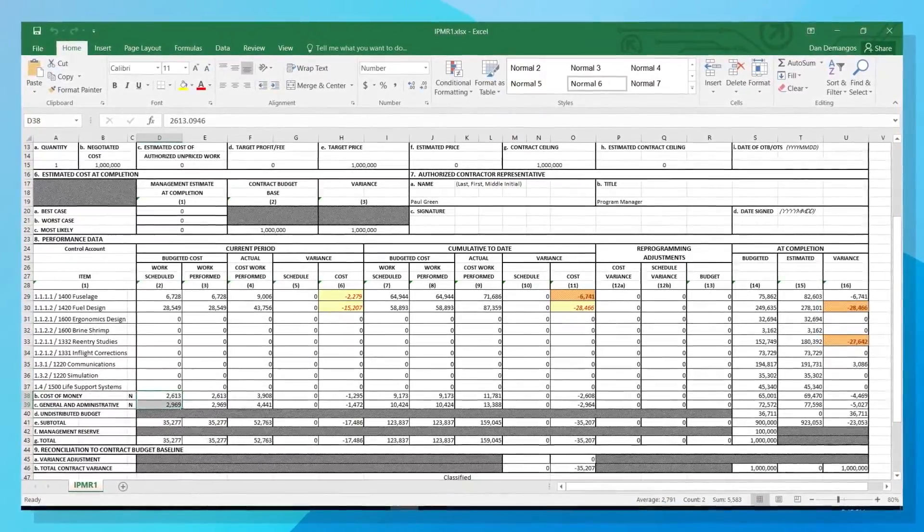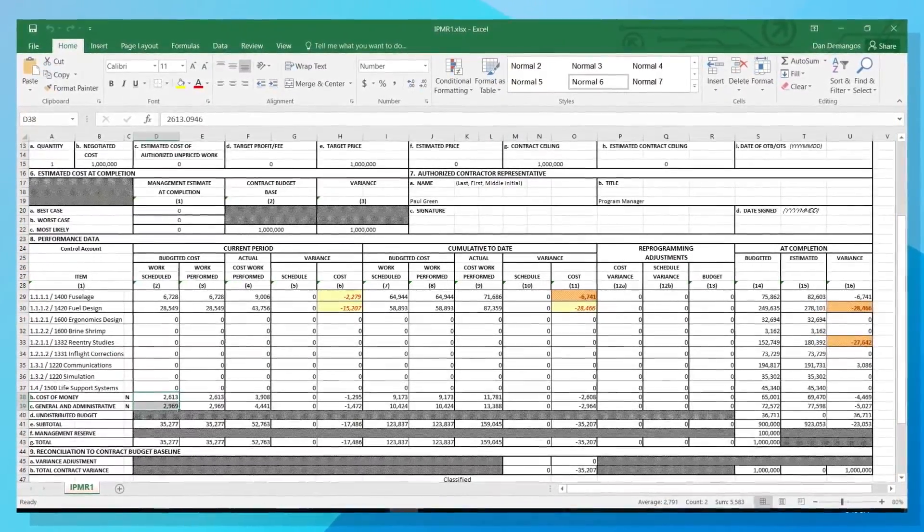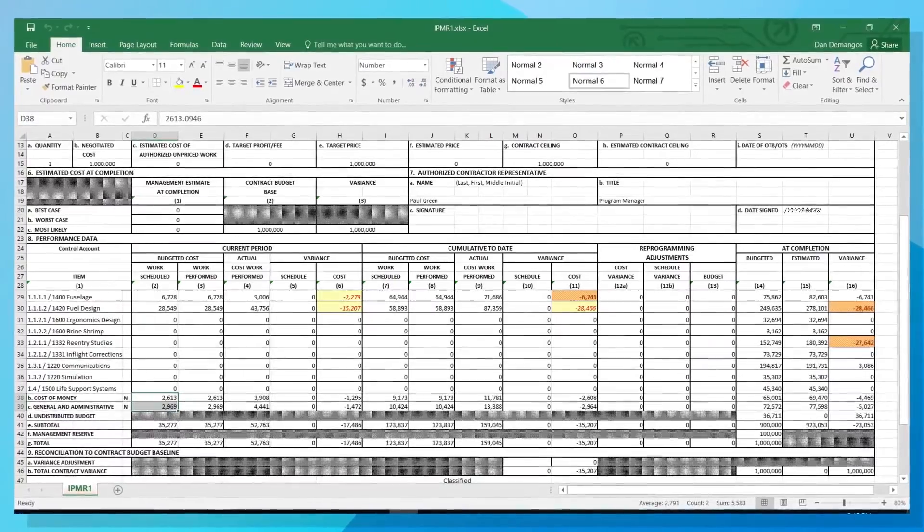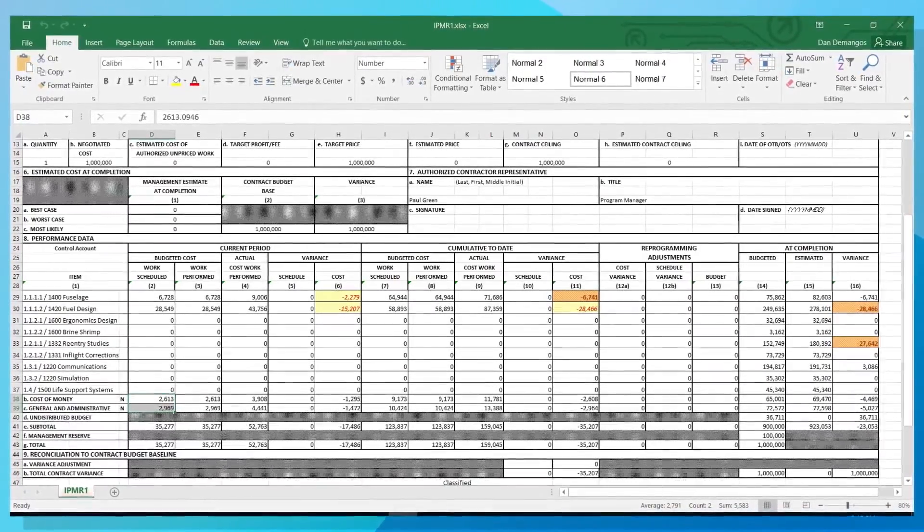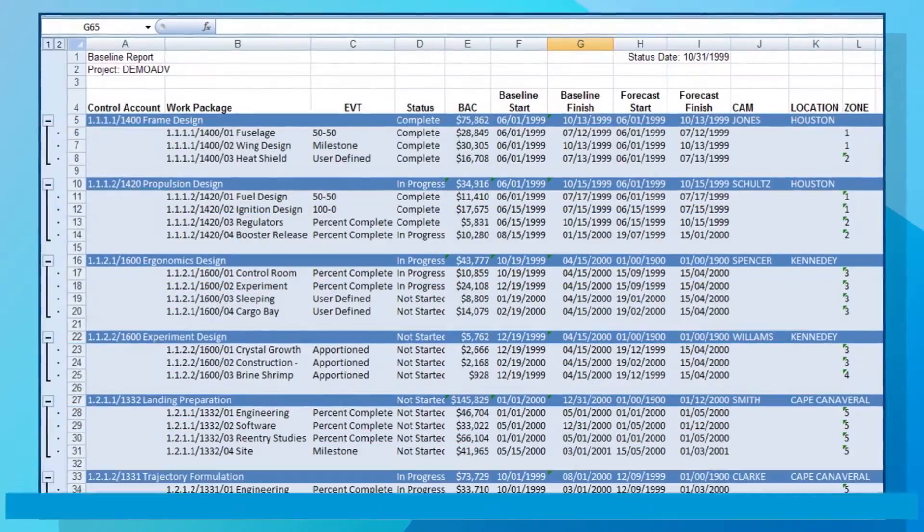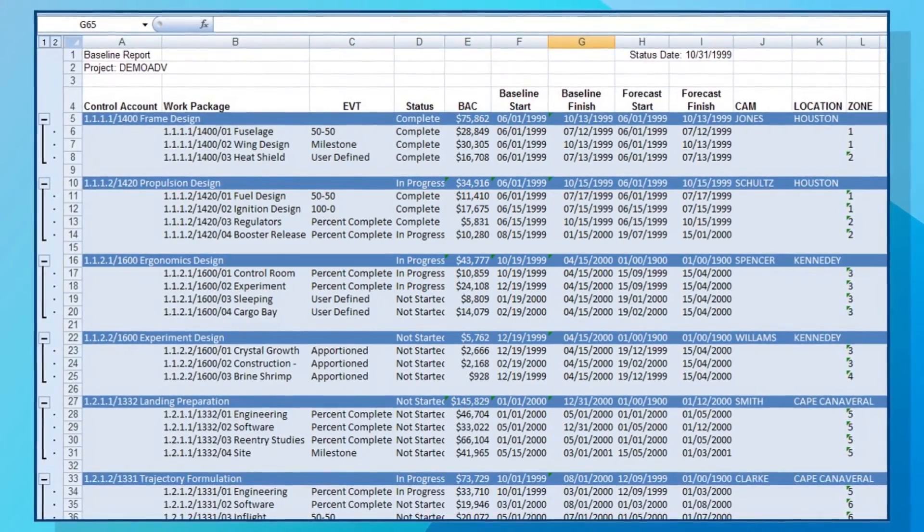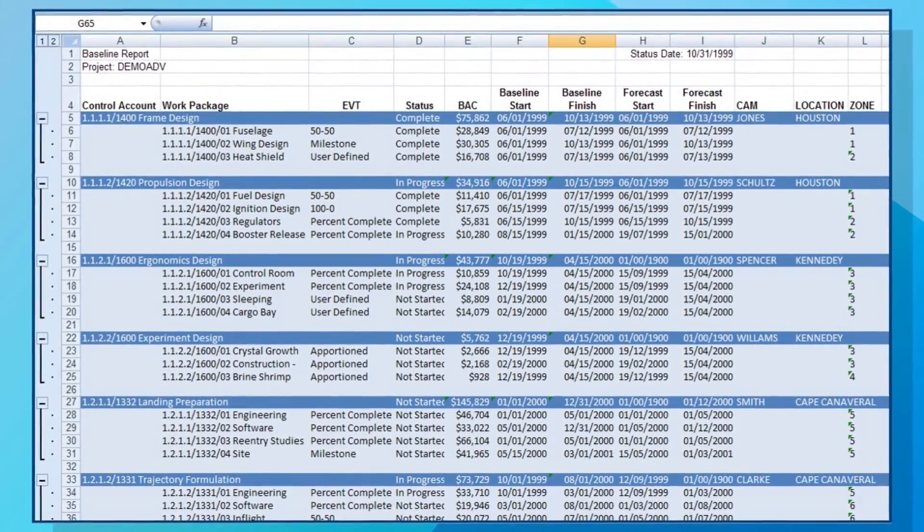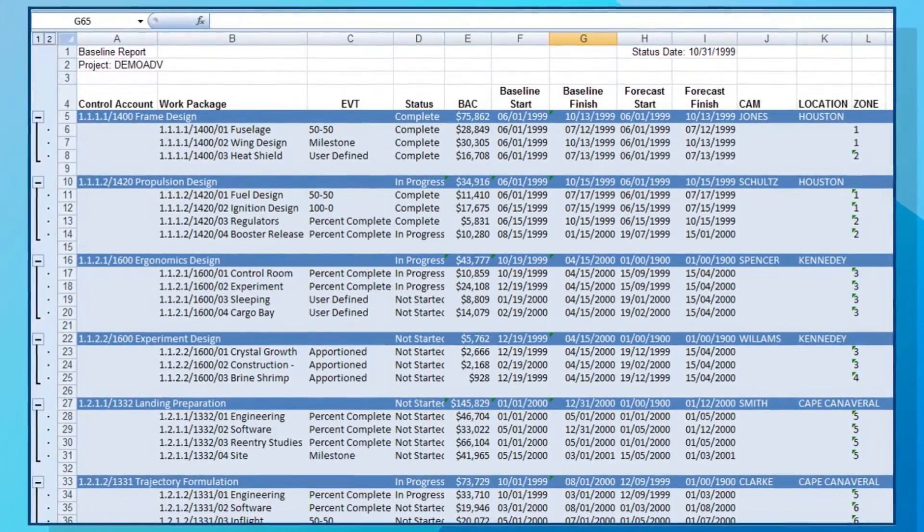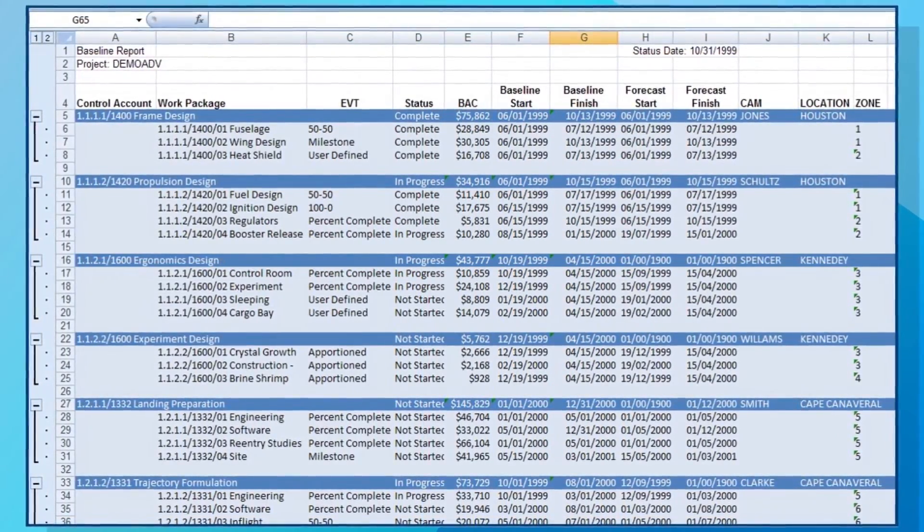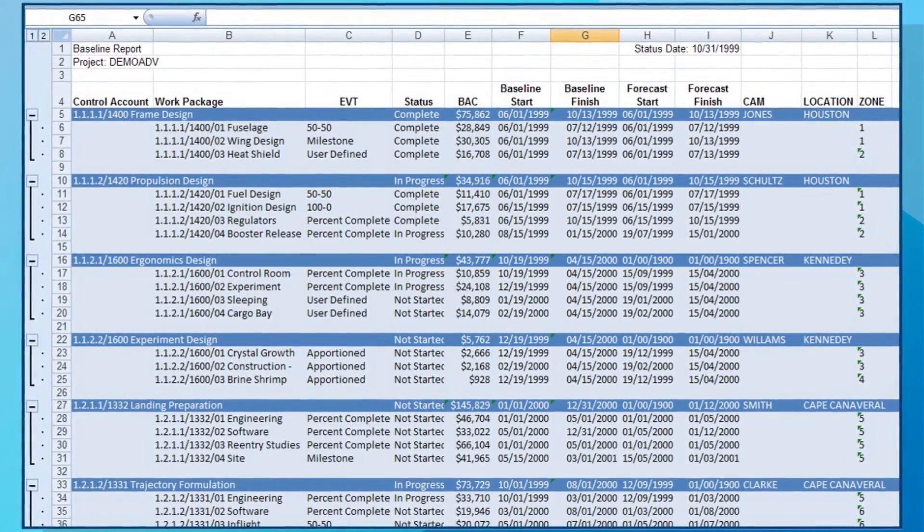Cobra helps manage project performance and oversight by providing increased control over project costs and the ability to easily report on earned value requirements. It satisfies all the rigorous requirements of the EIA 748 standard on EVMS and provides 11 earned value techniques to provide flexibility in measurement and all standard EVM reports for all federal agencies.